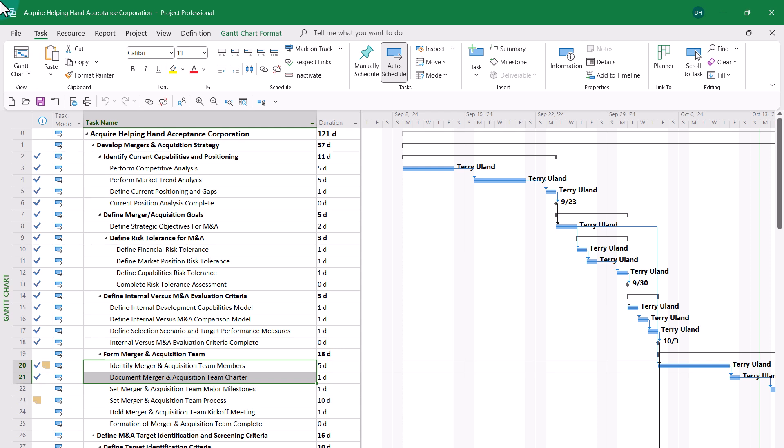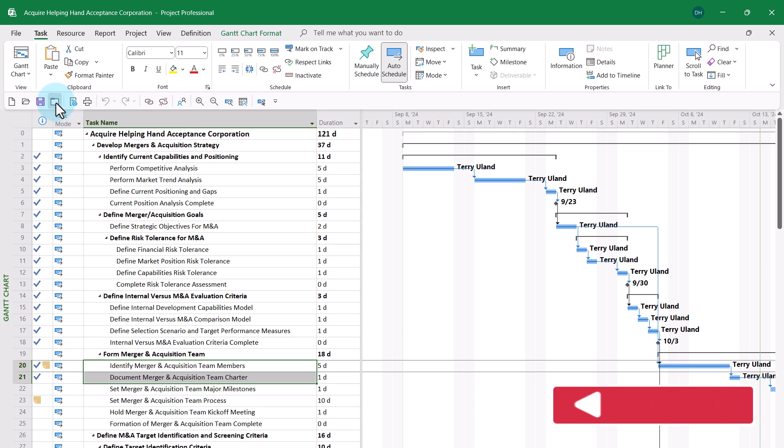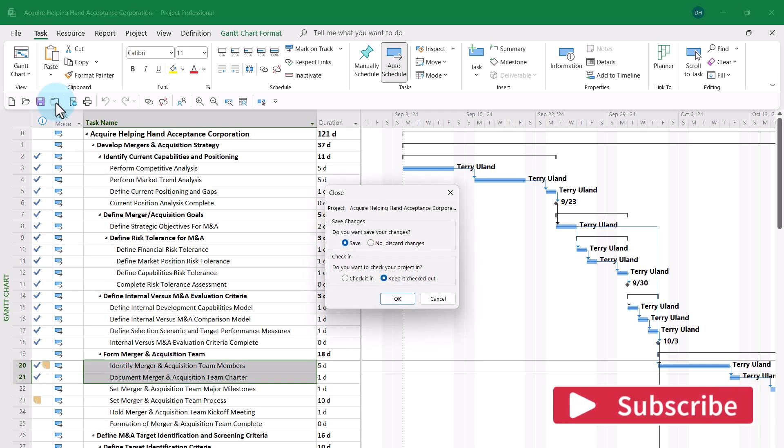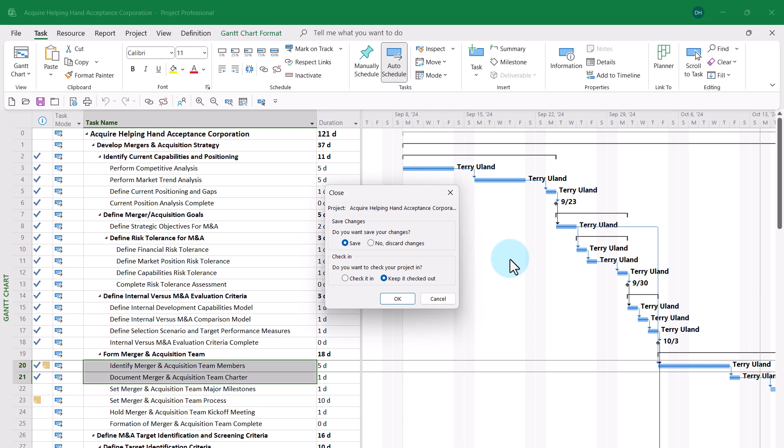When I'm done working with the project in offline mode while I'm on the airplane, I can click the Close button. But in the Close dialog this time, I do need to leave all of the default options in place. Do you want to save your changes? Yes, I want to save. Do you want to check in your project? In this case, no, I want to keep it checked out.